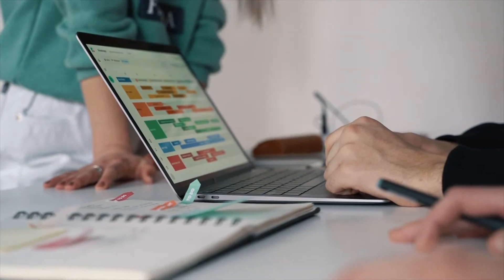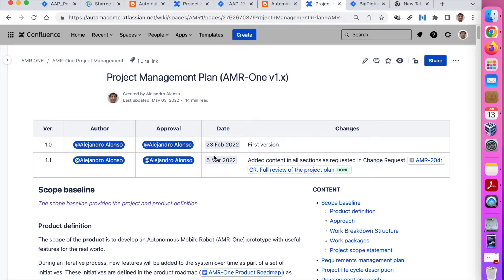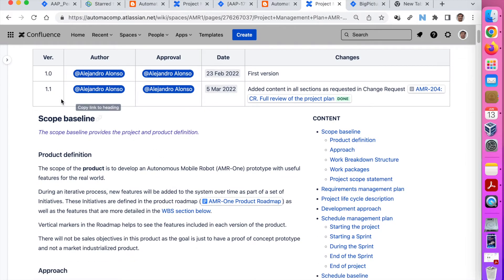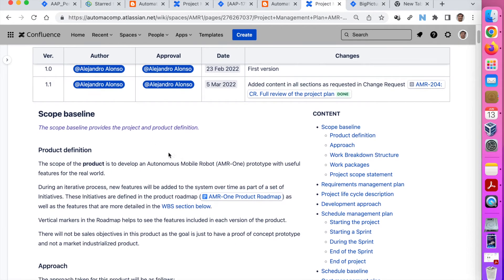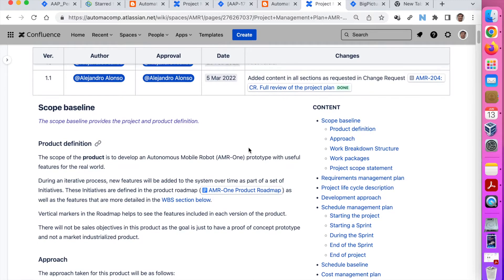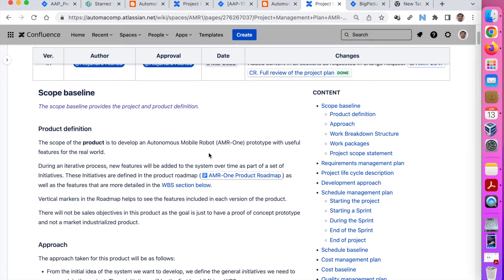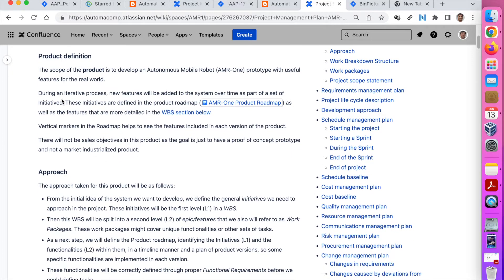Let's see some common sections using the AMR1 project as an example. We have the project management plan for AMR1 version 1.x. As I explained before, there were some requirements that apply to version 1 and some to version 2. What is common to have here is a scope baseline that really provides the project and product definition. What I include here is the product definition — what the product will do. In this case: an autonomous mobile robot prototype with useful features for the real industrial world.